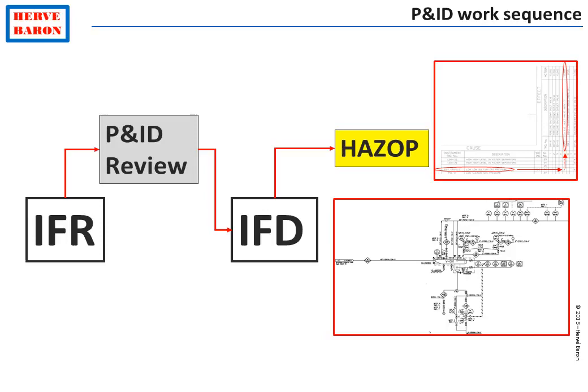These safeguards will be added on the next revision of the PNIDs, called the Issued for Construction revision. This issue for construction revision will also incorporate interface information from equipment vendors, such as utility lines, size of piping connections, including drain lines, vent lines, and so on.